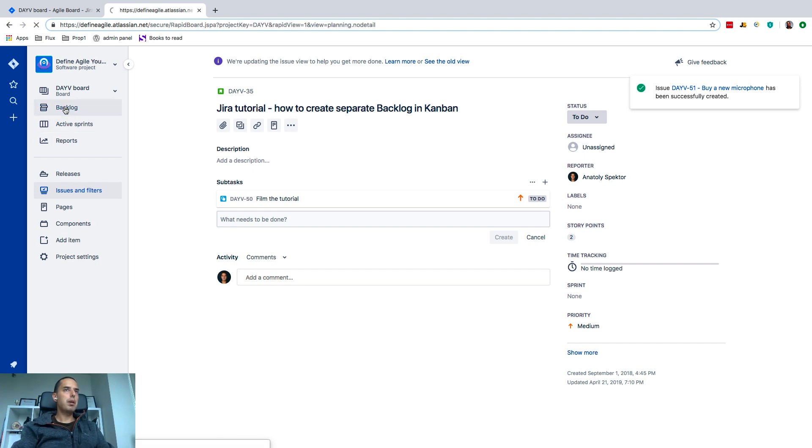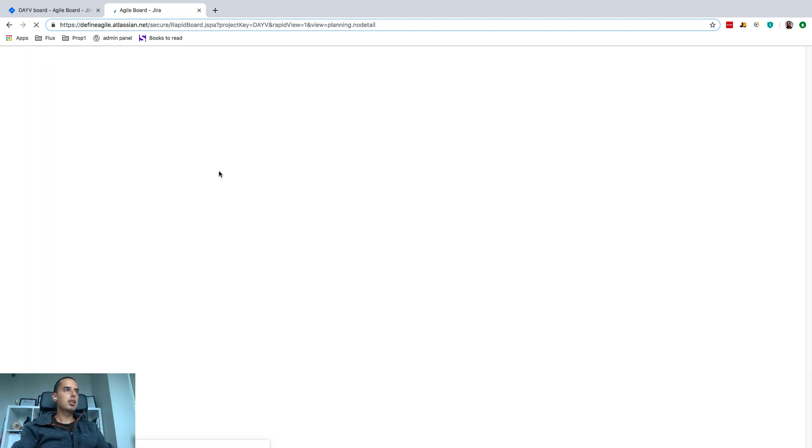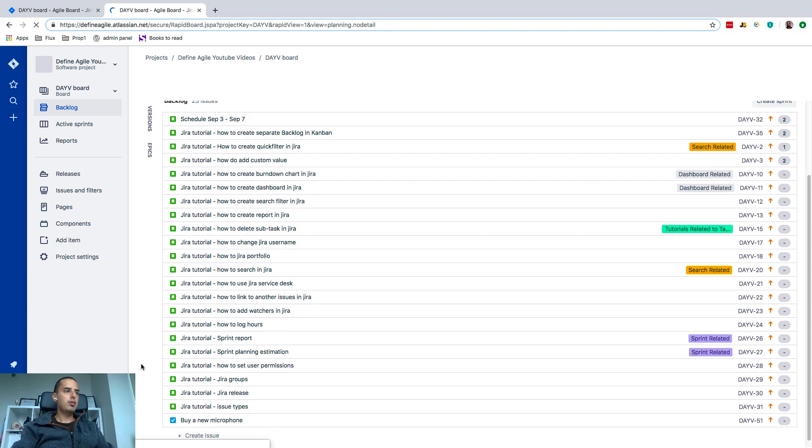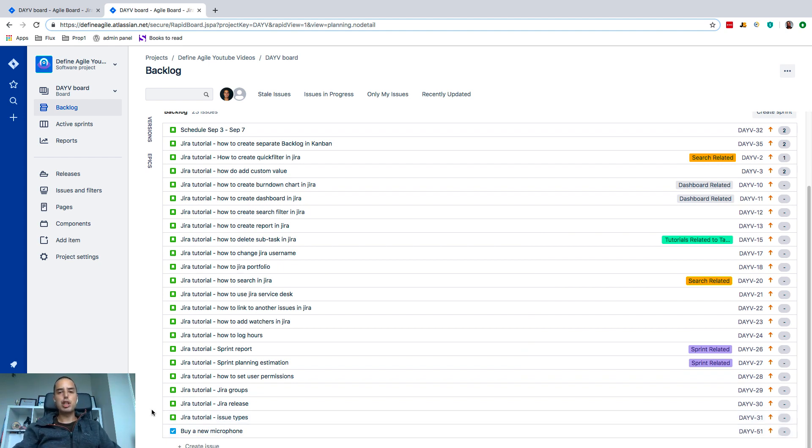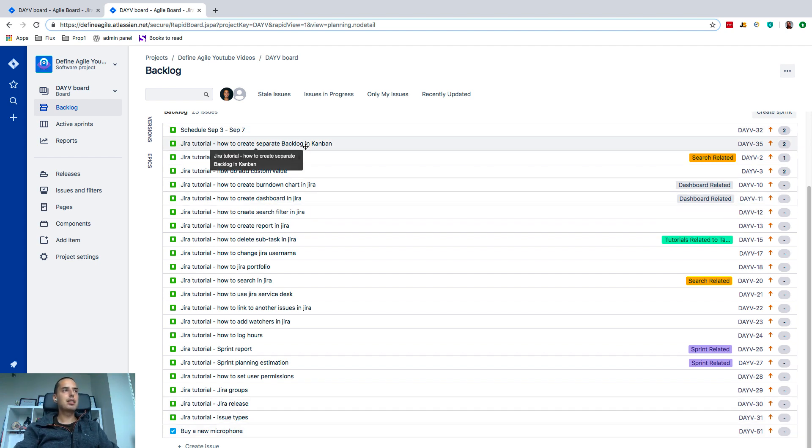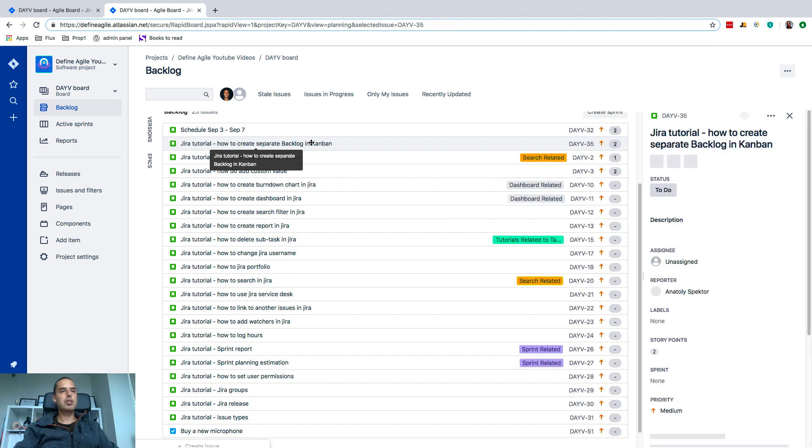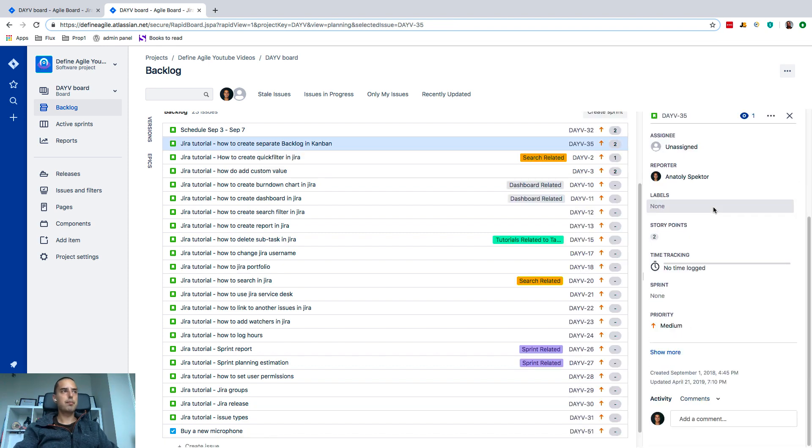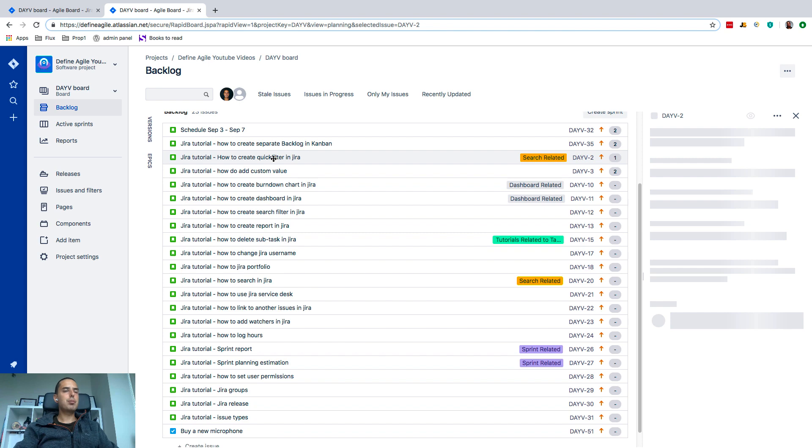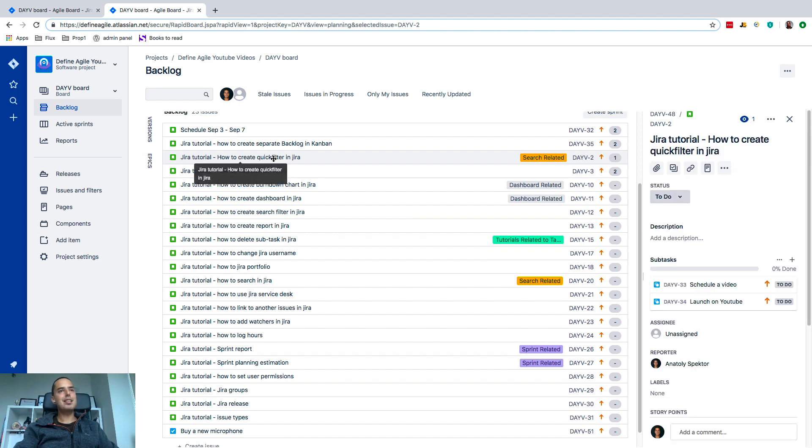Go to backlog again to see it. So as you might see, tasks are appearing in a backlog, epics do not. Stories for sure do appear on a backlog, and subtasks—they don't appear directly, but they do appear here if you go inside of the story itself.